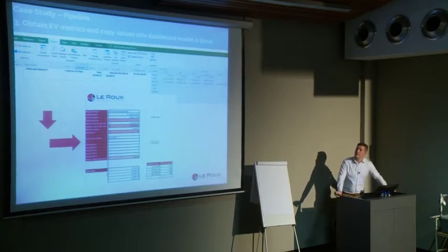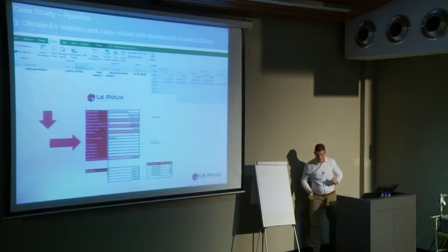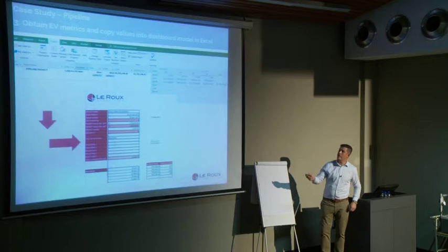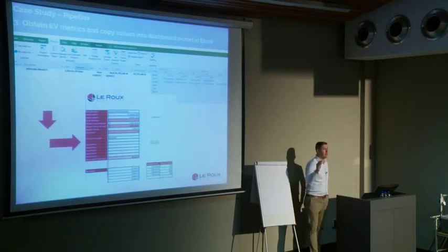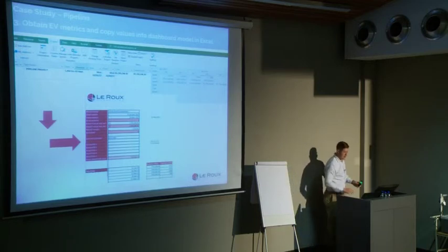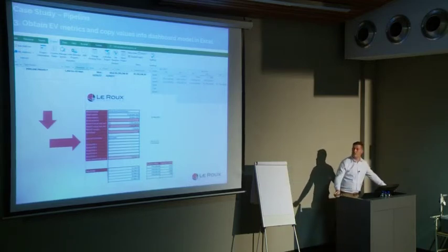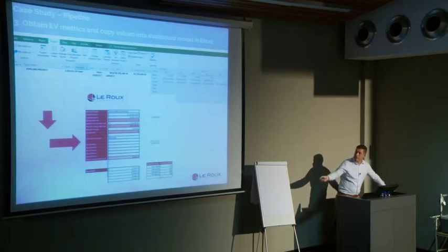So there you can see I've extracted the man hours plus the cost and then the earned value. Just take note, in projects the earned value and the planned value are also cumulative. So those are the values per month, and those are the values already accumulated up to the last point. I then use my Excel sheet, and I simply copy those values and paste them in there per month. And then I'll show you my Excel sheet.